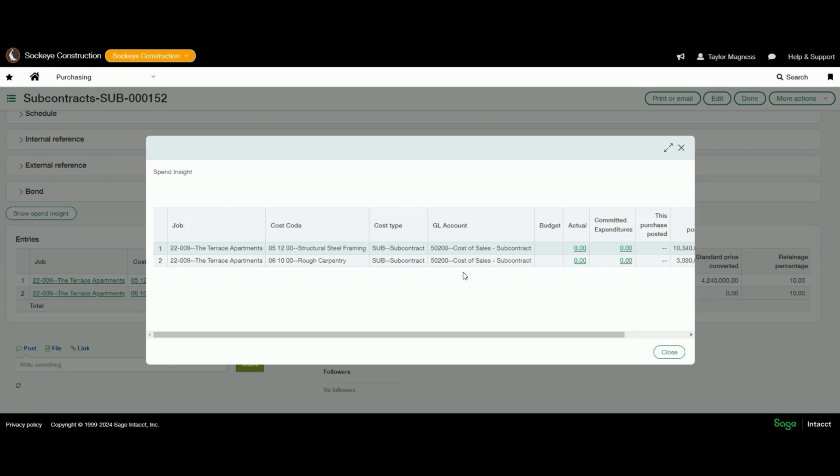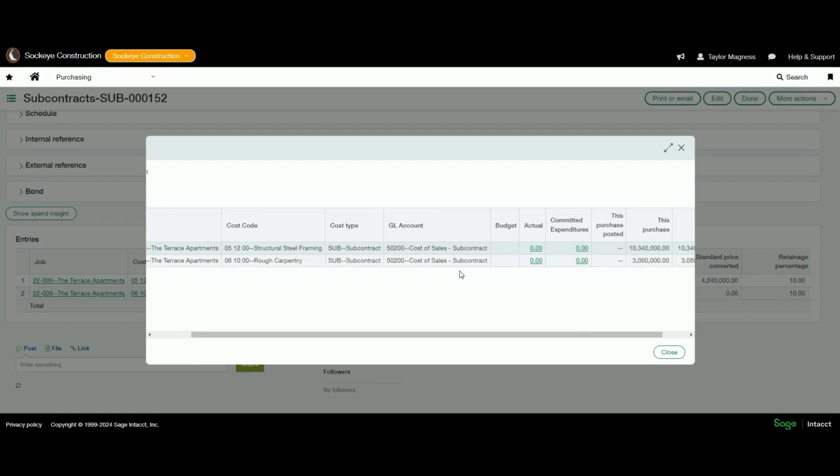And we can configure this one of two ways. We can configure it, one, to essentially just throw a flag for us, indicating to the user that based on what they coded, if it's over budget, would let them know, and they could click submit again to proceed. The second option is to put a full stop on that transaction, to the point where the user needs to save that document or transaction down in a draft form